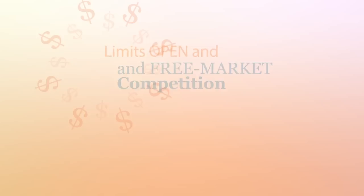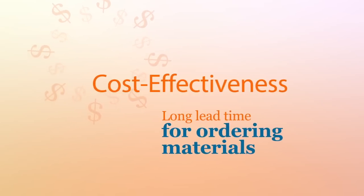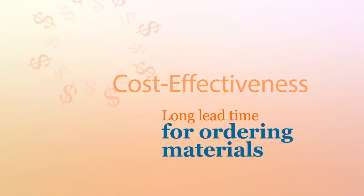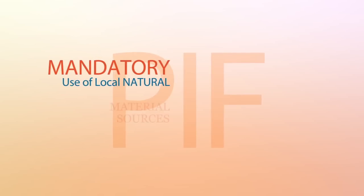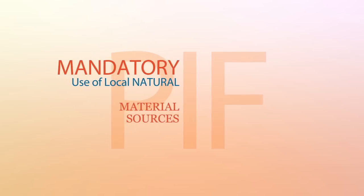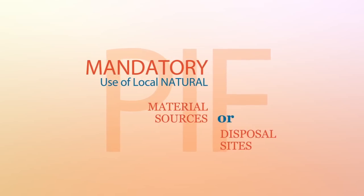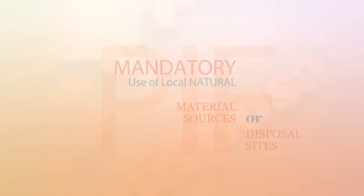Reasons often cited are cost-effectiveness or there is a long lead time for ordering materials, such as structural beams or specialty items. Mandatory use of local natural material sources or disposal sites for projects requires a PIF, since this restricts a contractor's option of material selection and operational efficiencies.